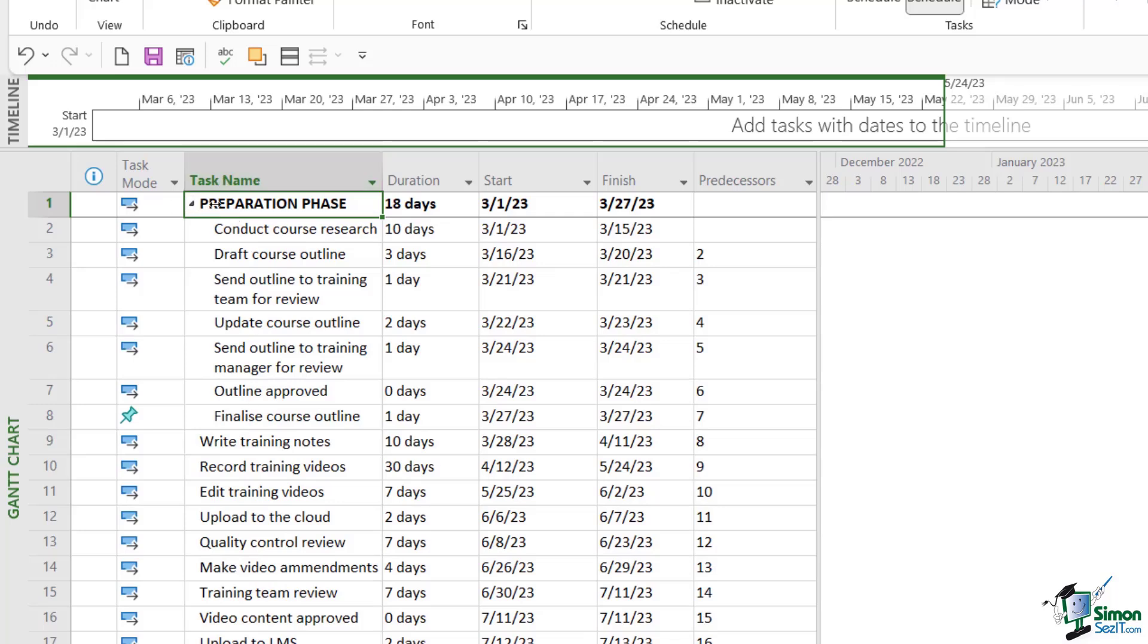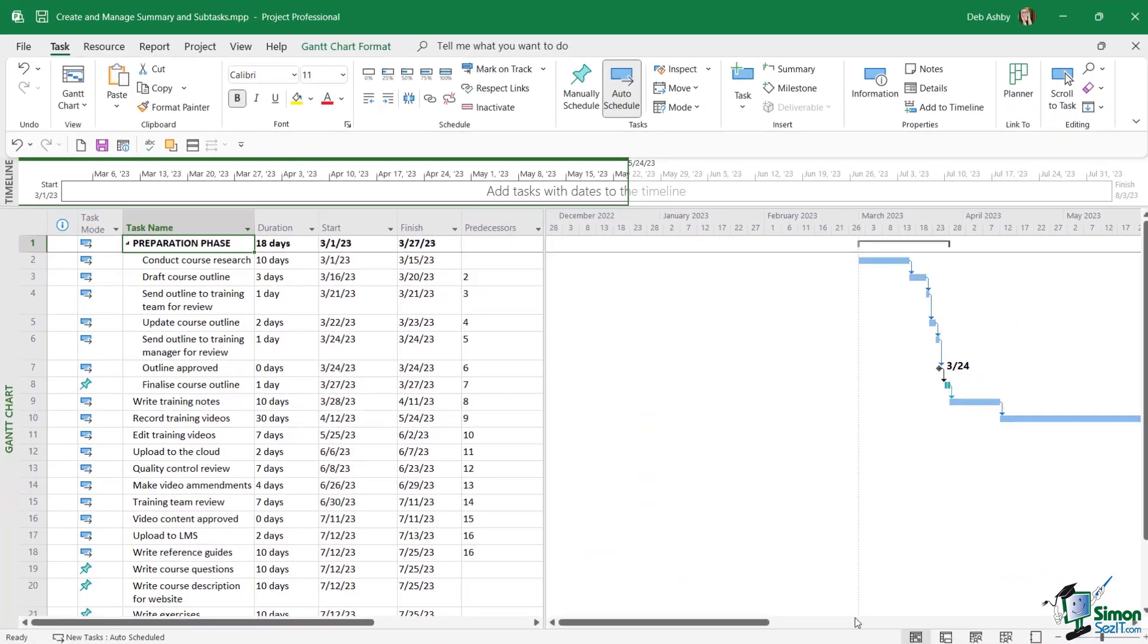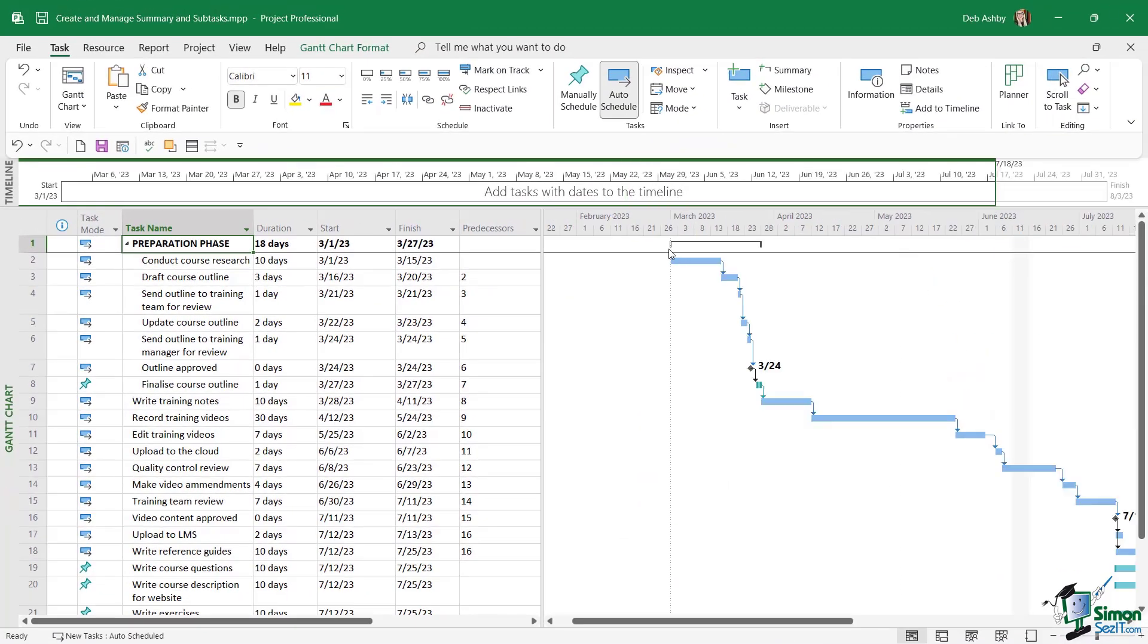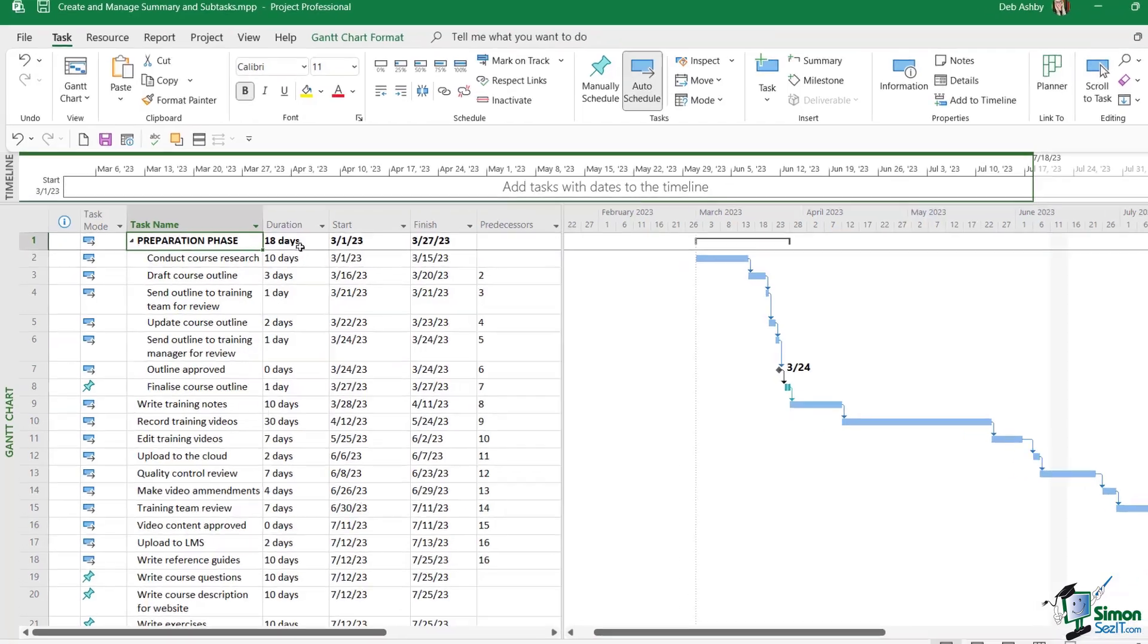Also notice with this summary task, if we check out the timeline, summary tasks are represented by a black bar. Now the duration of the summary task is very much defined by the durations of the subtasks below it.